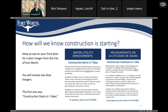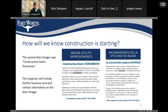Underground utilities are the first phase of the construction process. Be on the lookout for a notice — the first one will give you a week's heads up that construction is coming so you can be prepared, and the next one will indicate that construction is happening the next day. This will give you a heads up of when to expect construction to start near your property.